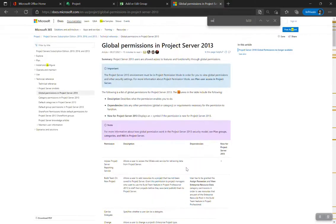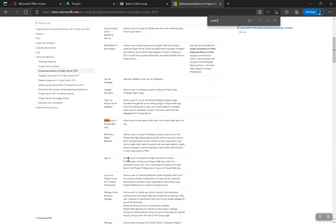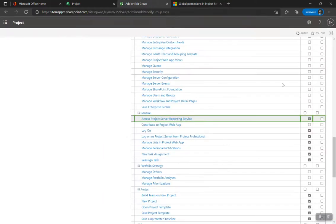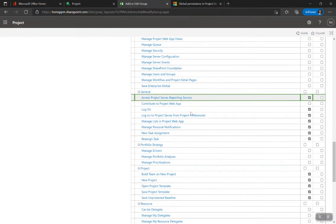Found it — 'Contribute allows a user to edit items within lists within the Project Web App root site.' This allows some admin features you definitely don't want project managers doing. For instance, if they have Contribute to Project Web App they can actually change the theme for Project Online — I've seen a couple of companies experience that. So do not allow that. Access to Reporting Services is fine; logging on from Project Professional — yes, definitely allow that.